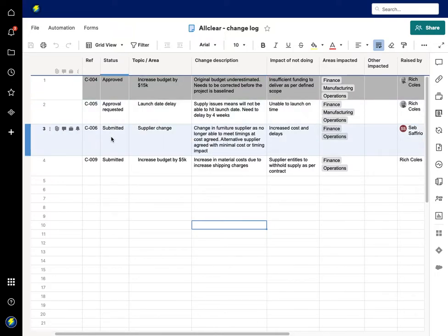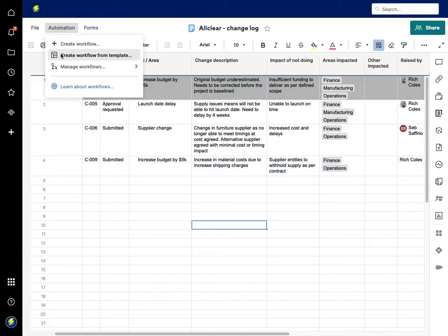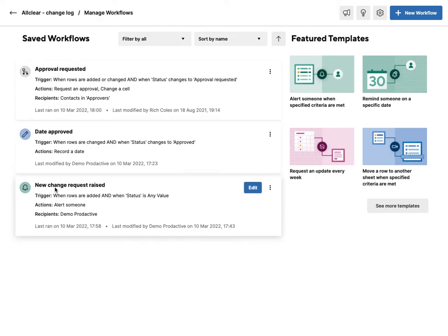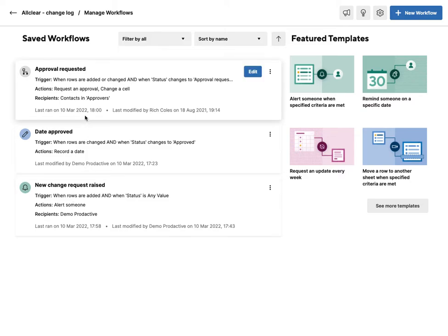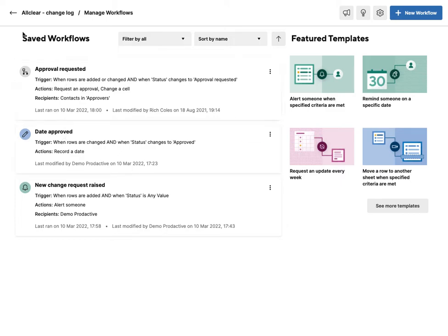Here you can see the various changes—ones which have been approval requested, submitted, etc. You can create a variety of workflows depending on how you want to make this work. In this case, when a new change request is raised, it then alerts someone. Then when the status is changed to approval requested, it sends off a notification to the approver who is in that cell.